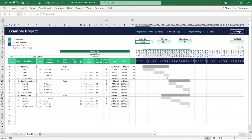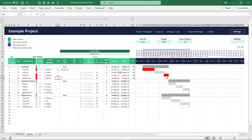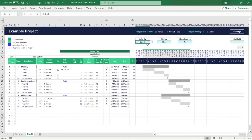In the issues color mode, every item marked with an issue symbol is highlighted in a warning red color, and you always have the option to deactivate all coloring by switching to the default color mode. Once you have set up your project schedule, you might want to keep track of the adjustments you make over time.